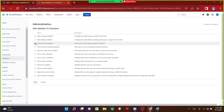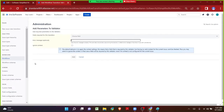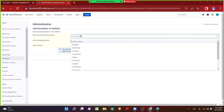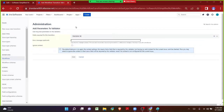By clicking on the appropriate validator name and clicking Add, the very next step is it will ask: you do not want the field to be empty, so what is the name of the field? Here, based on the requirement, we can choose the appropriate field name. In our scenario it is going to be the description field — I entered the value and selected the field called Description. Then we have to add the error message, which is completely optional.